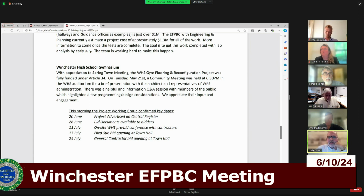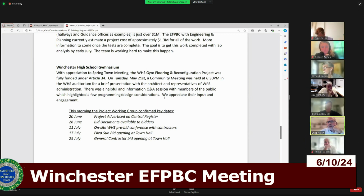We went to the school committee, I think on May 28th. I think Jay forwarded this to the committee a couple of days after, so I think you all got this last week. This is really a quick summary. Our working group is meeting with Chris Blesson every week on Friday. He was out to the high school gym with some engineers last week. These are the key dates. We've got project advertisement June 20th. Bid documents will be available a week later. We have an on-site pre-bid conference scheduled for July 11th. We have a sub-bid date and a general contractor bid opening July 25th to get somebody on board in August.